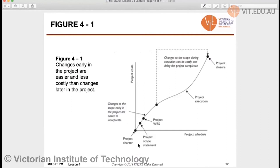We'll now look at a figure showing that a project starts with the project charter, which we already know, then goes through the project scope statement to the work breakdown structure, which we'll discuss today, then through project execution to project closure. The key point from this figure is that changes early in the project are easier and less costly than changes later in the project, which is very true and logical.